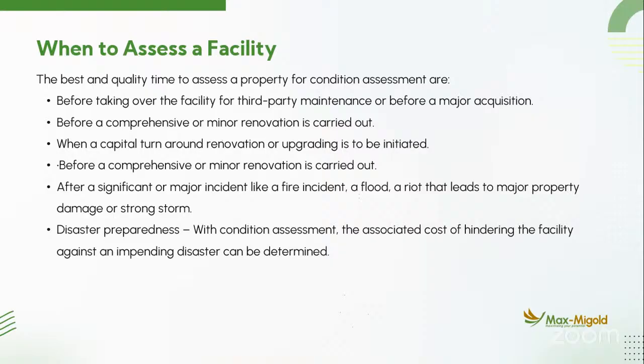So I need to conduct what we call condition assessment to know the condition of the building walls. This will help me to know areas where I have algae, areas where I have build-ups, areas where I need to do screeding, and areas where I need to apply chemical before I can start my painting. It will also help me to determine the kind of paint that I want to use.